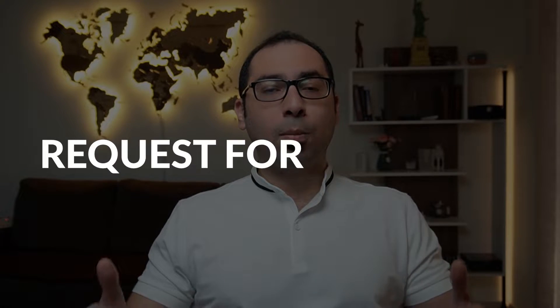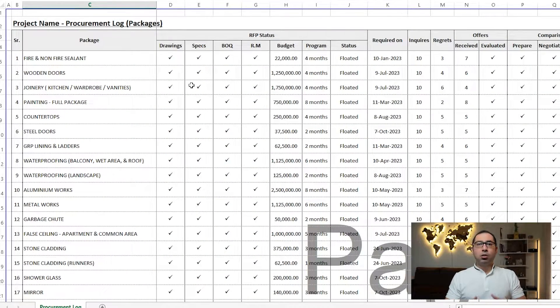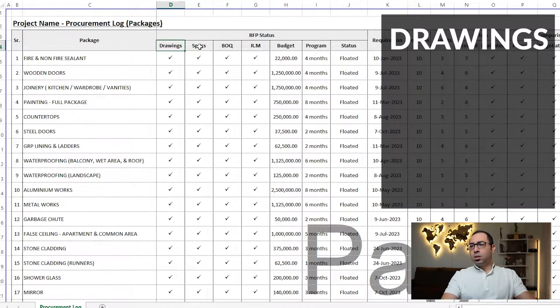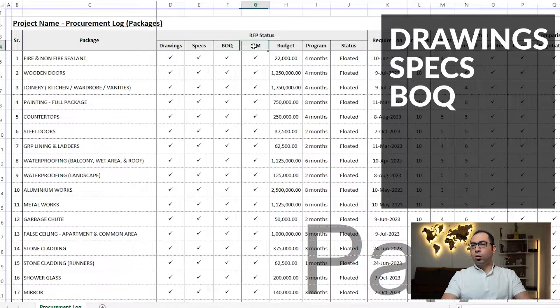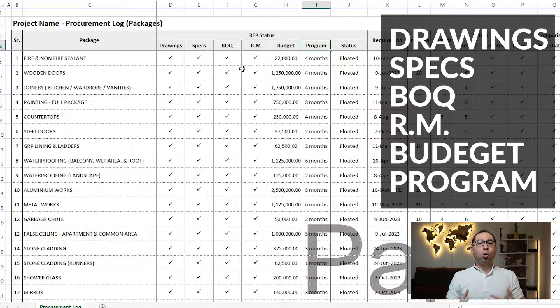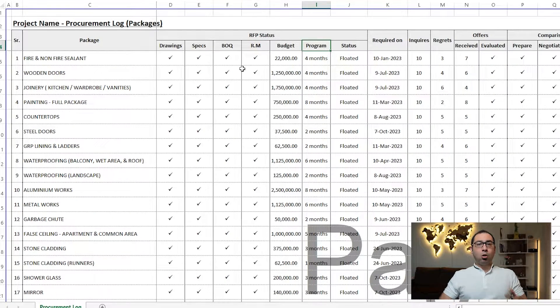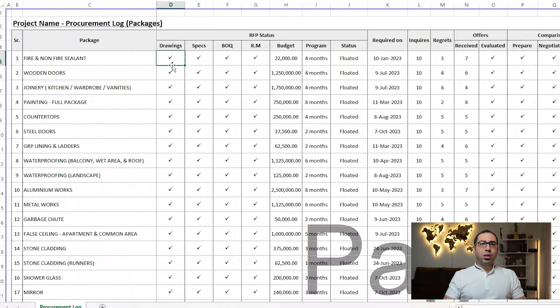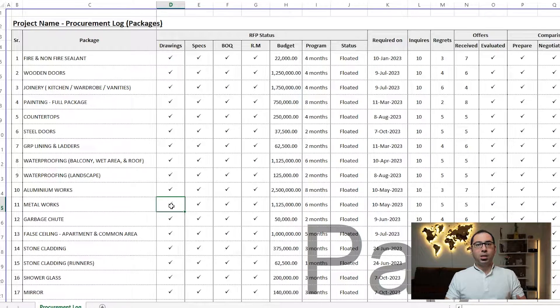After we know the packages, we need to start preparing something called an RFP — Request for Proposal. The RFP consists of a set of documents: drawings, specifications, BOQ, responsibility matrix, and also the budget and program of work for any package. For drawings, we need the drawings that represent the steel doors, aluminium works, or whatever package we're dealing with.